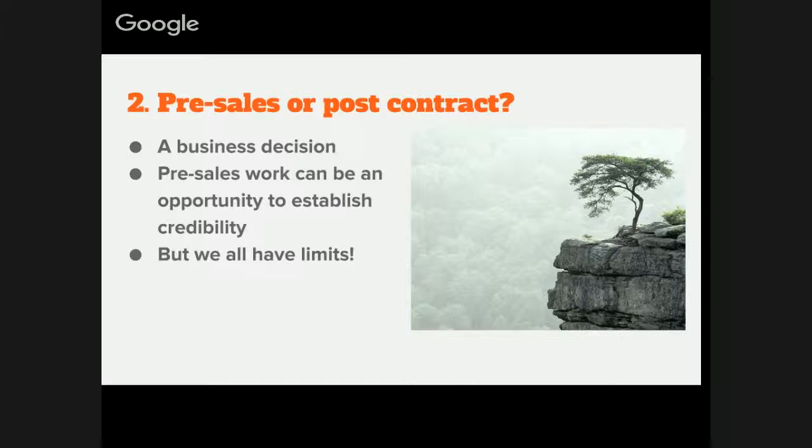Well, if you're not really clear on that, what technologies are you going to use? You're potentially sustaining a lot of risk in signing that contract, because you're either going to get into solving these deep contractual scope questions after you've already committed by signature, or you're just having to make that decision. So that's an important thing in terms of this information gap, and ultimately, whether you apply these gap analysis techniques before or after.